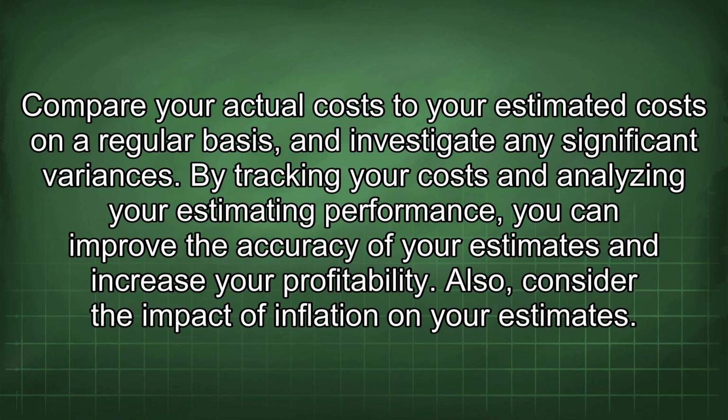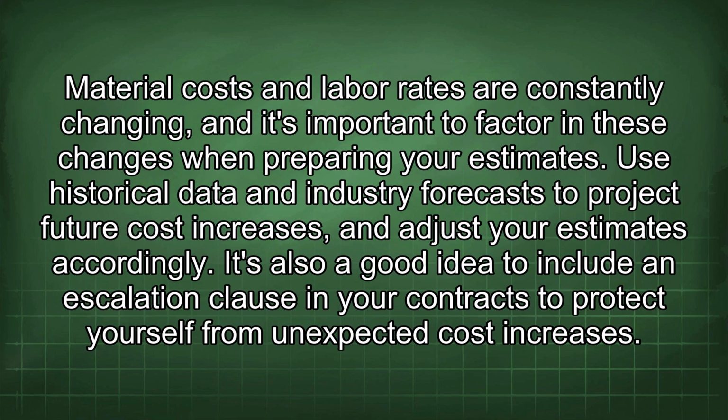Also, consider the impact of inflation on your estimates. Material costs and labor rates are constantly changing, and it's important to factor in these changes when preparing your estimates. Use historical data and industry forecasts to project future cost increases and adjust your estimates accordingly.